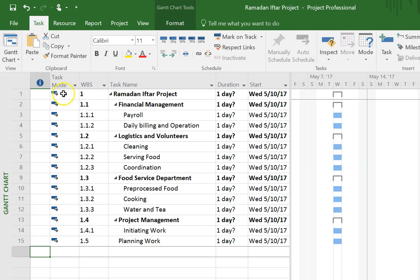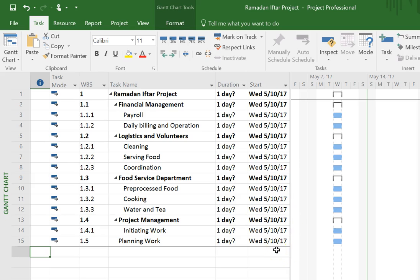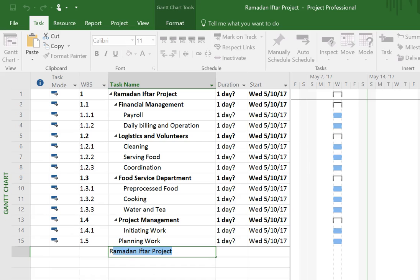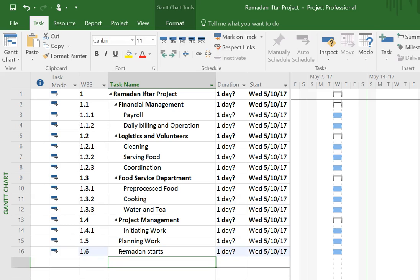In the Gantt chart view, when you look at the Task Mode column, this little icon means it's an automatically scheduled task, which means Microsoft Project puts it in the earliest day possible. I'm not going to start scheduling yet, but there are some key milestones that were called out right away in the project charter. One of them is the date that Ramadan starts, and another is the day that Ramadan ends, 30 days later.